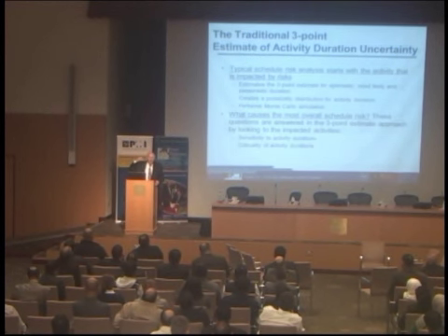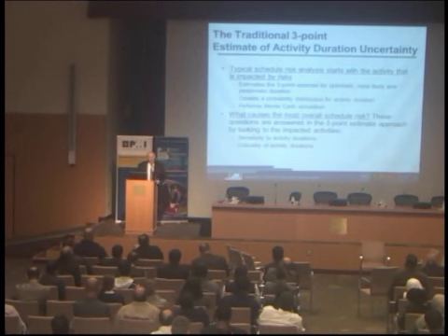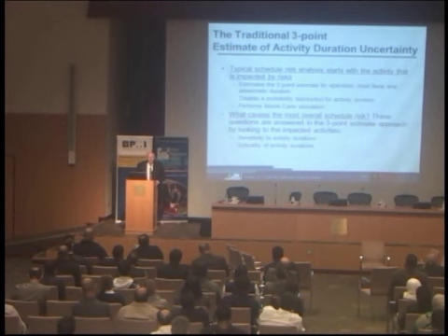So those are the images of the various risks that affect that activity duration, imposed upon the activity duration itself. And then you do a risk analysis, which is a Monte Carlo simulation, and you pick durations from that. But you don't really have a way to trace back to the root causes. So guess what? When we get to the end of the analysis and we want to be able to tell management what to do next, risk mitigation is the obvious answer.